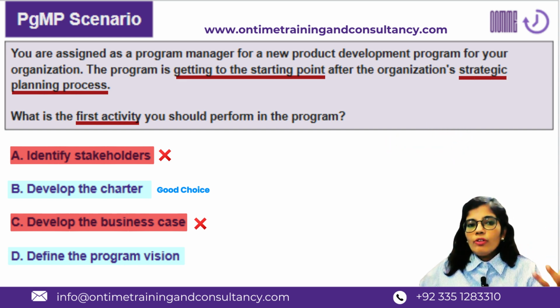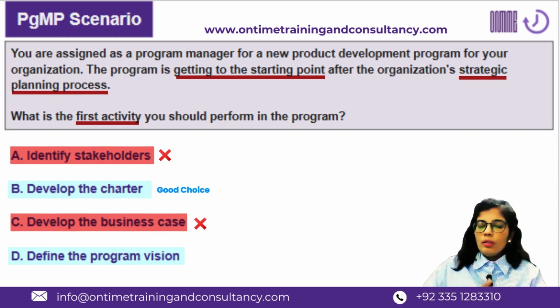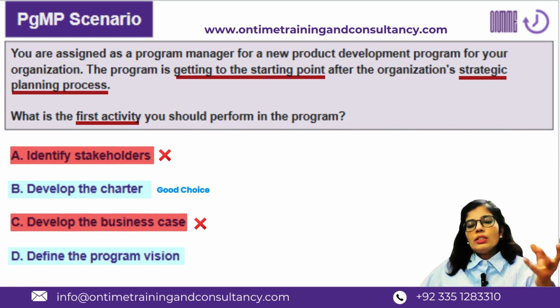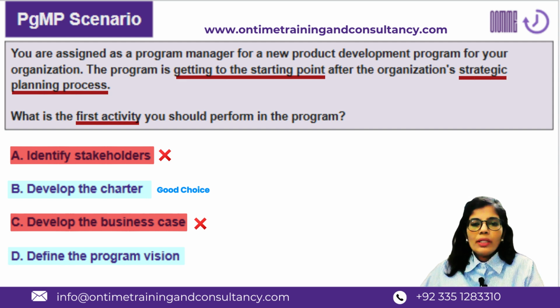The objective, which is defined based on the program vision, is the reason why you are doing that program in the organization, right? So vision defines the strategy, the strategy defines strategic objectives, and strategic objectives define the different tangible and intangible benefits, which actually define the program WBS and the scope of work.